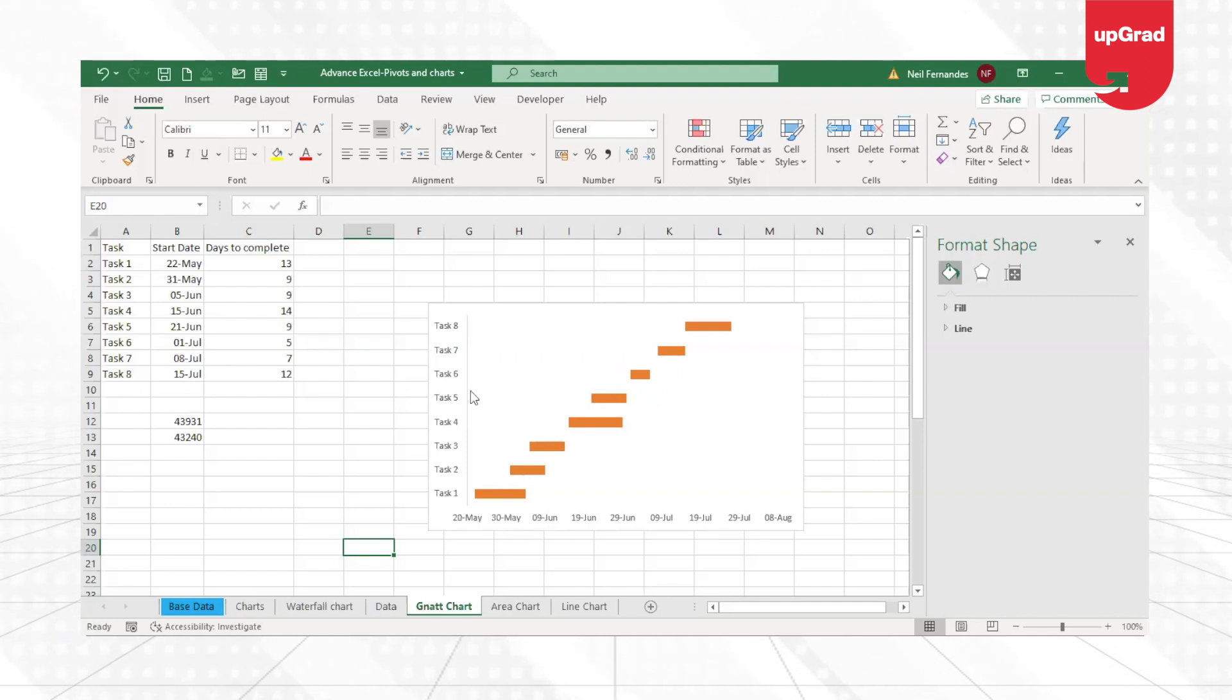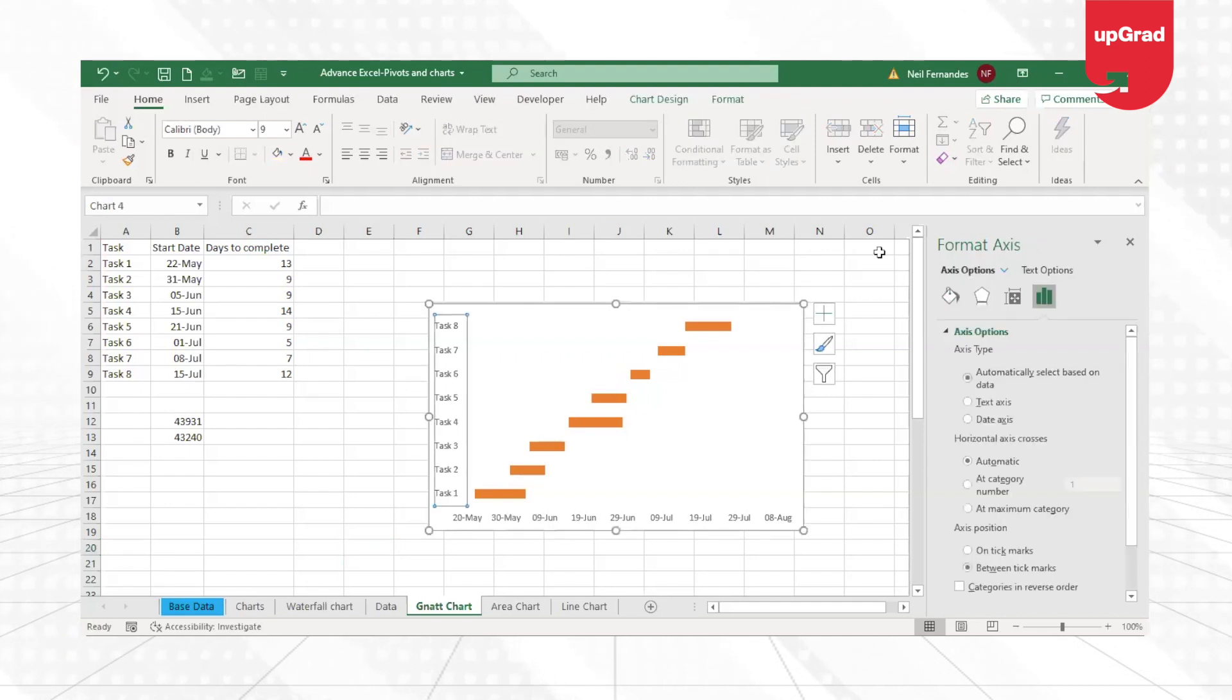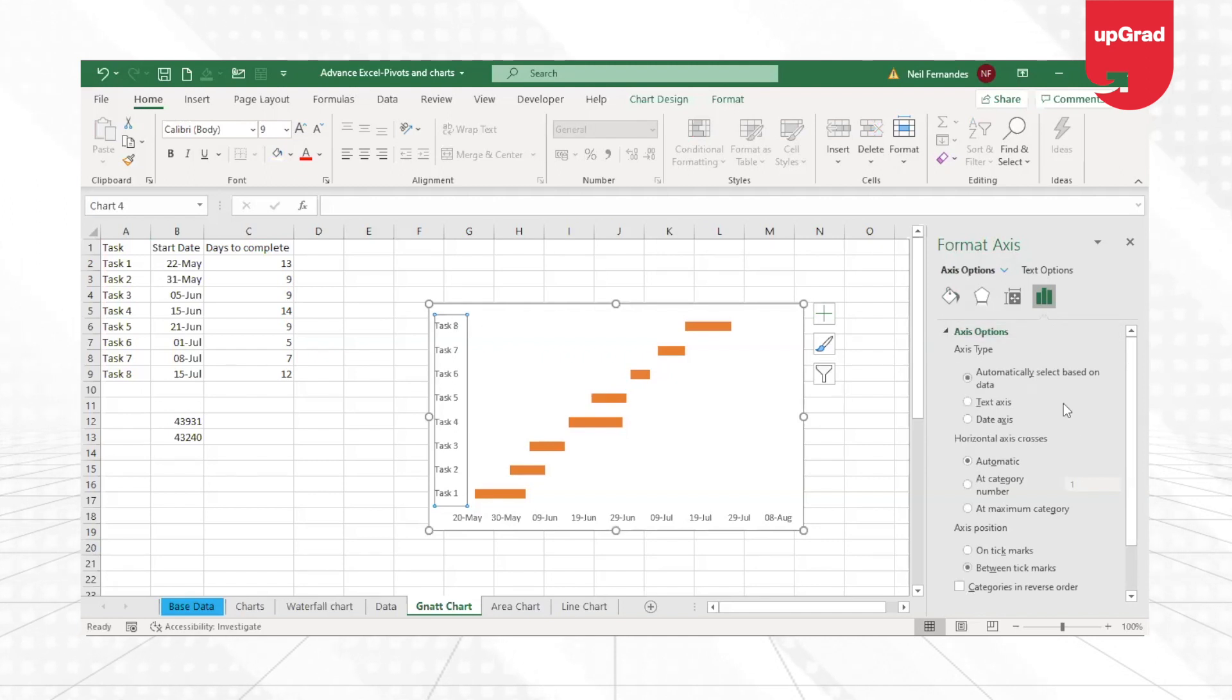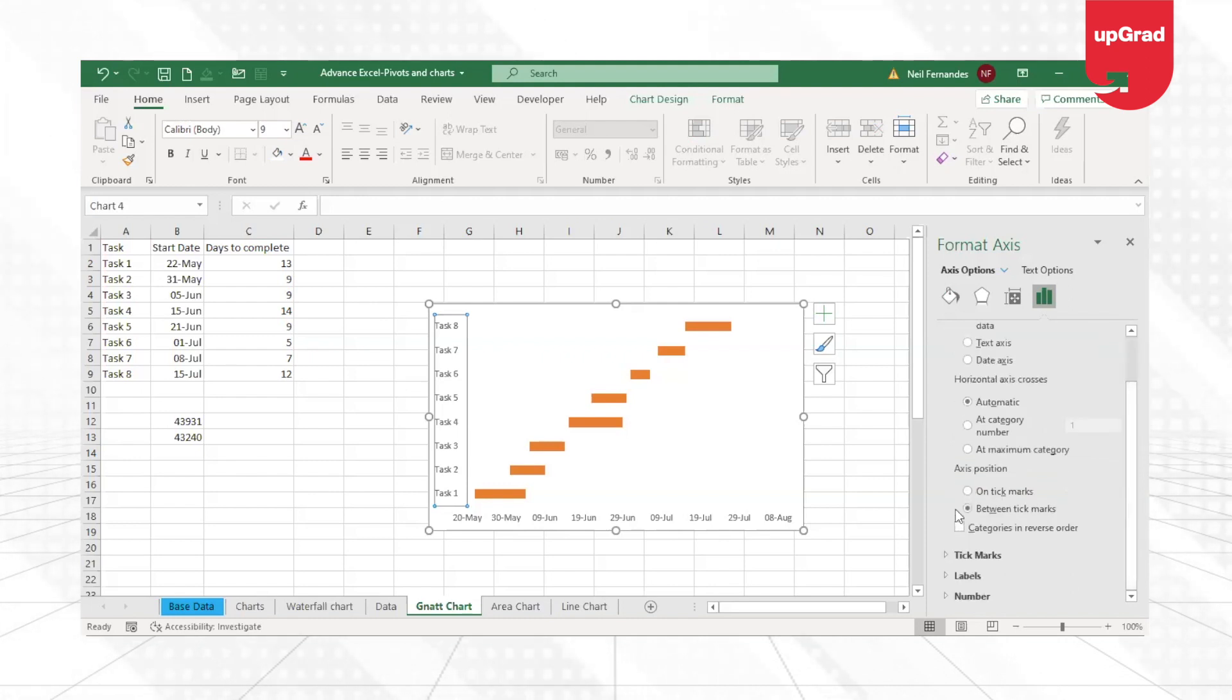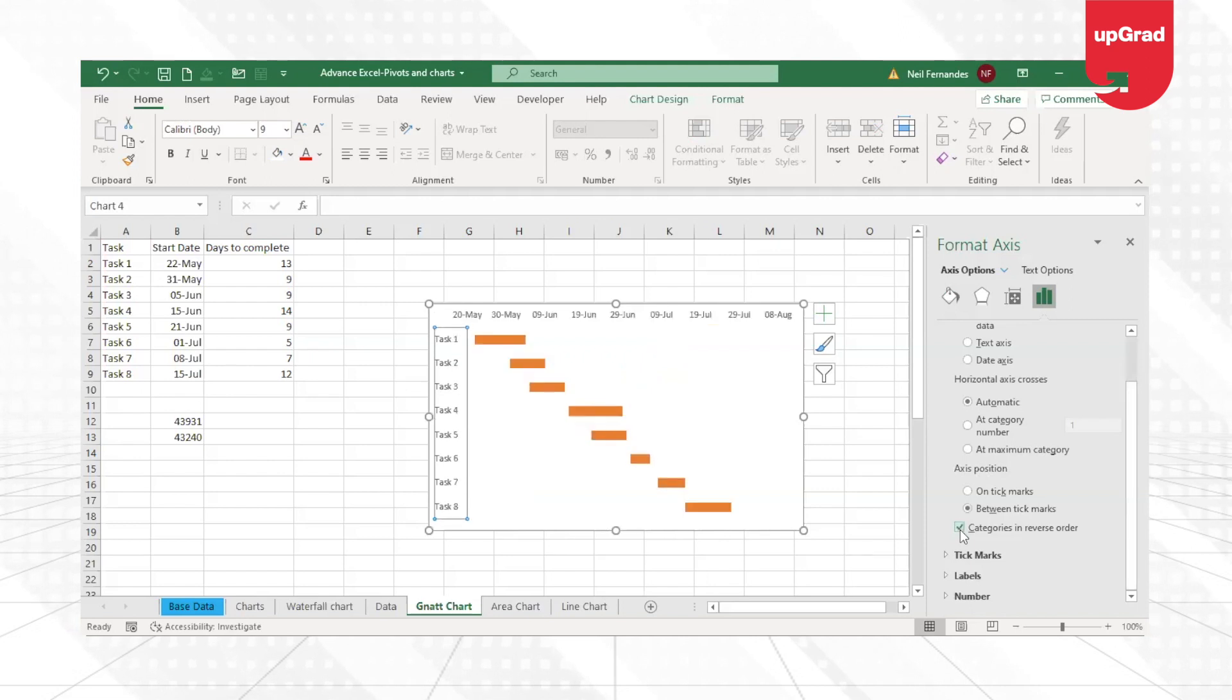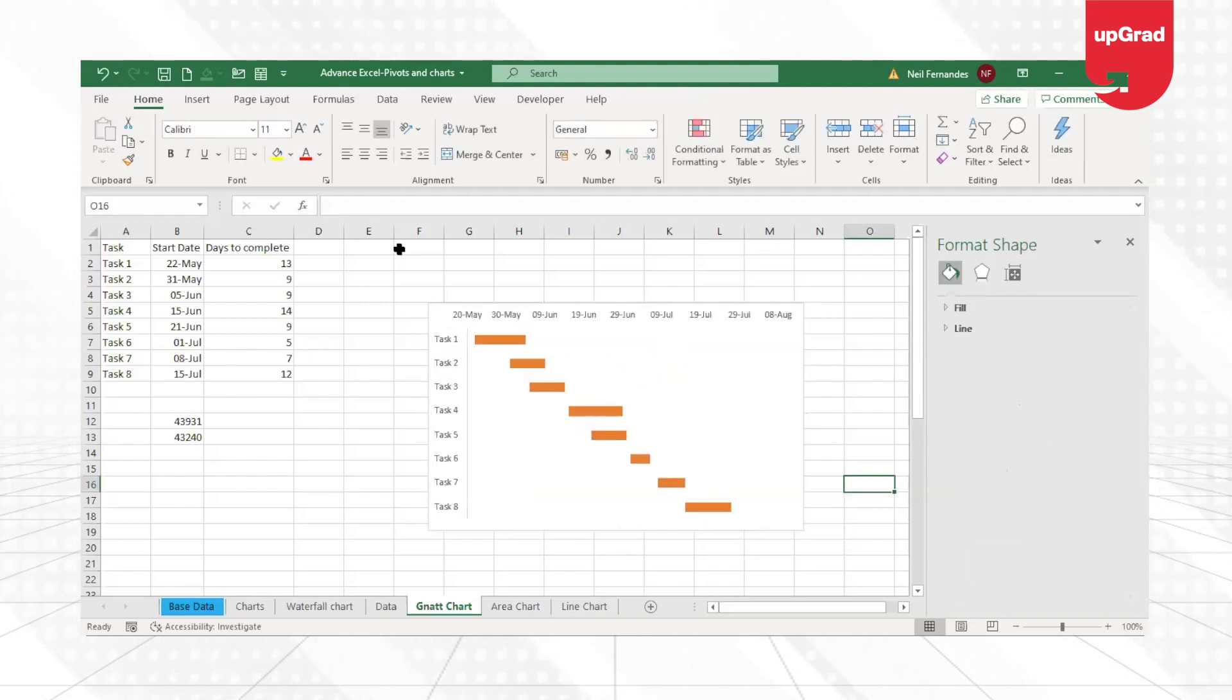In order to do that, I'm going to again take the task and the axis option from this. What I need to do is I want to show it in the reverse order. So if you look at the axis position, I'll click on Category in Reverse Order.